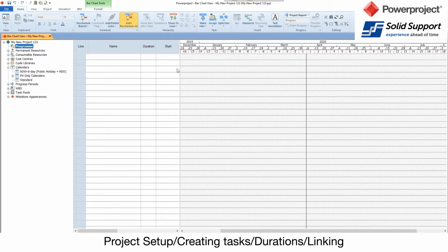So be careful about entering activities down to the hour, because you would then have to monitor, modify and control those. So we always work at a level where you need to work. So if I'm going to create my first one, I'm going to create a first one.